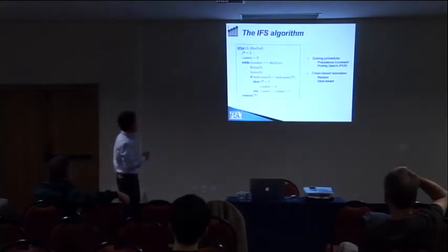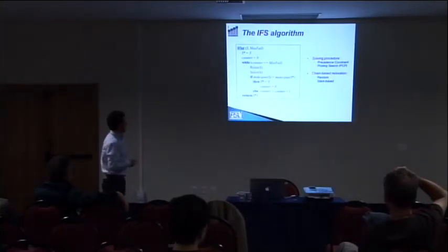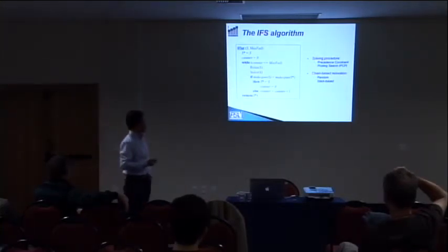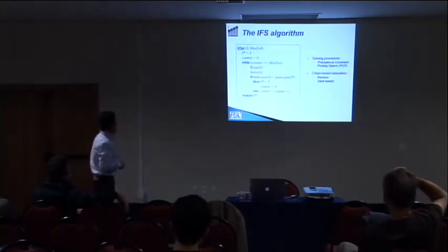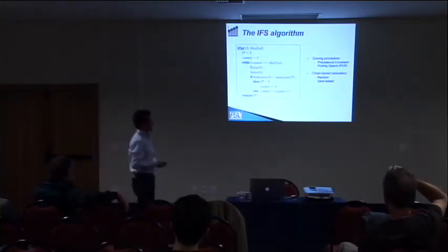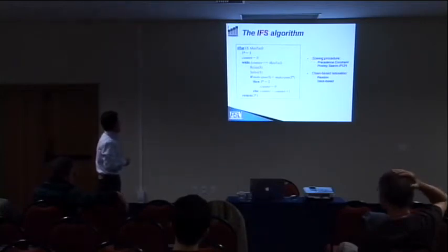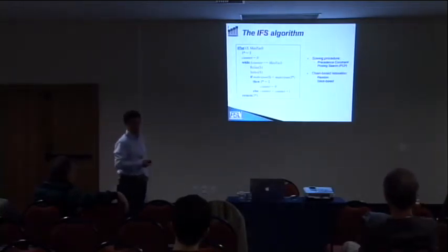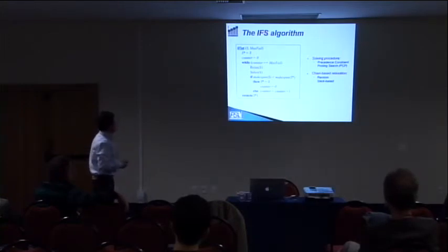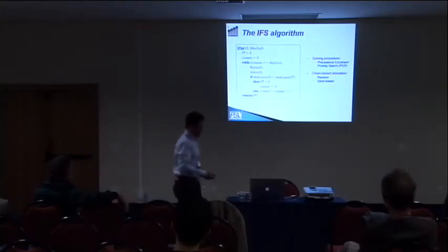This means we remove at random some solving decisions and then apply a solving procedure to find a new solution. If the makespan is better than the previous one, we store it. If we are not able to find a solution within a maximum number of attempts, we return the best solution found so far. We now describe the solving procedure and the chain-based relaxation, and how we implement them for the blocking version.